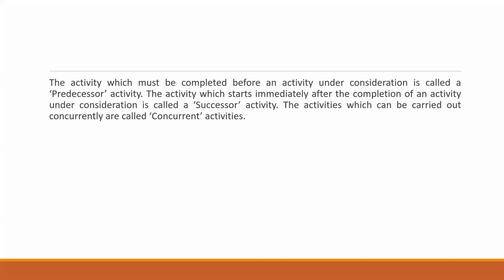We will also see some dummy activities, which will be required in cases where activities start from the same node and also end in the same node. In such cases, we need to introduce a dummy activity which does not have any time duration and does not play any role in the calculation of the overall project duration.